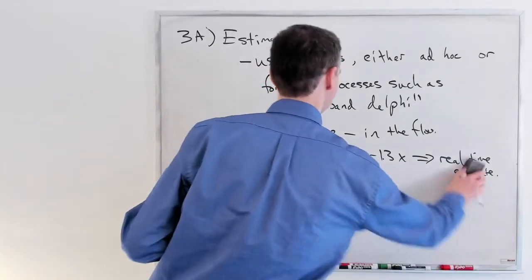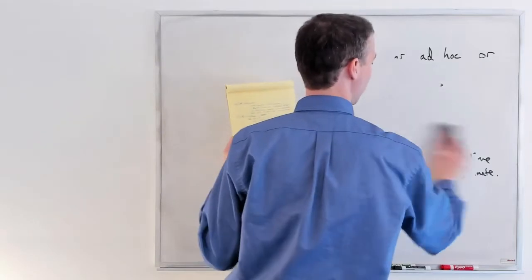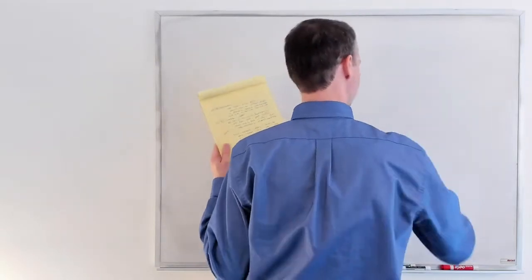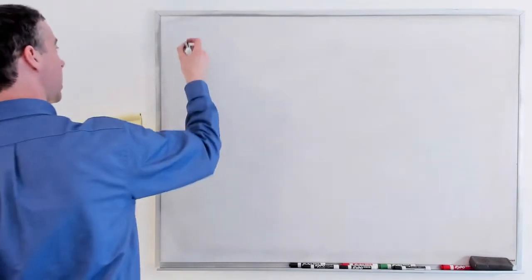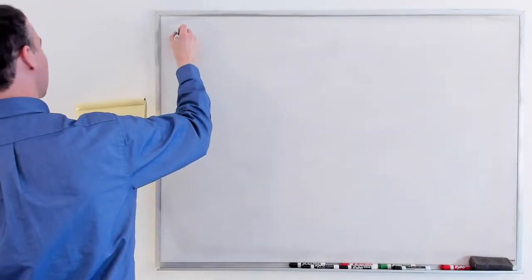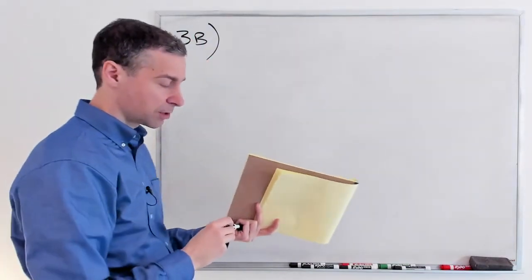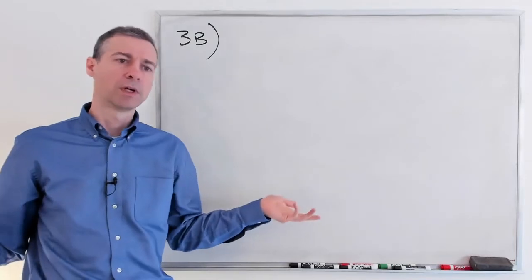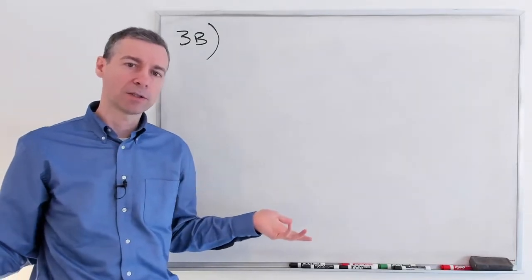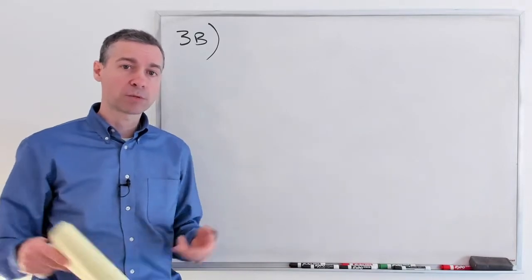What about this schedule that you're supposed to do? Well, that's the other big thing in the project plan. So you start with estimating, you come up with all the tasks that you can envision. Usually we would say your tasks should be no longer than 2 days long. You'll note that that's different than what we're doing in 342.